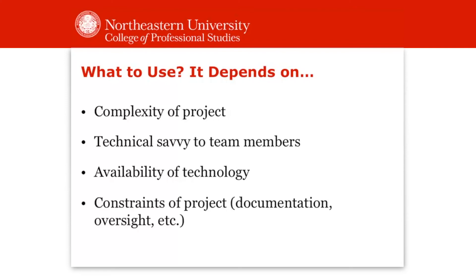It really depends on a number of factors you'll just have to work through until you find what works, prove it, and then use it going forward. Also look at project constraints — some projects have documentation or oversight requirements through a PMO that mandate what technology you can use. Outside sources, such as a government body, may require certain levels of encryption that some of these tools don't support. Look at these different aspects to determine what's going to be best.